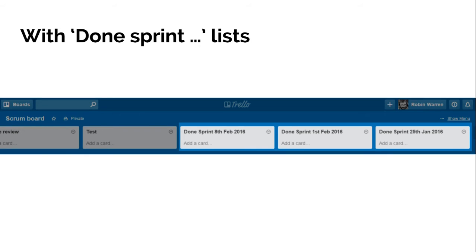Another thing I've seen people do, which is very handy if you wanted to remember what it was you did last sprint, or two sprints, or three sprints ago, they'll have a new done list every single sprint. Here I've just named it the date of the sprint, but if you're using sprint names you can put that in there.